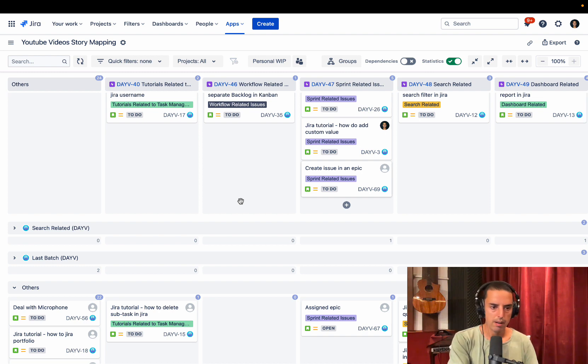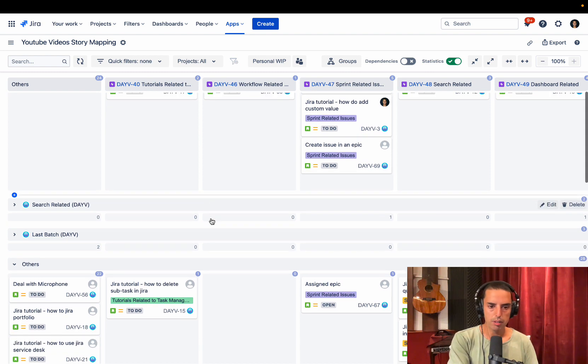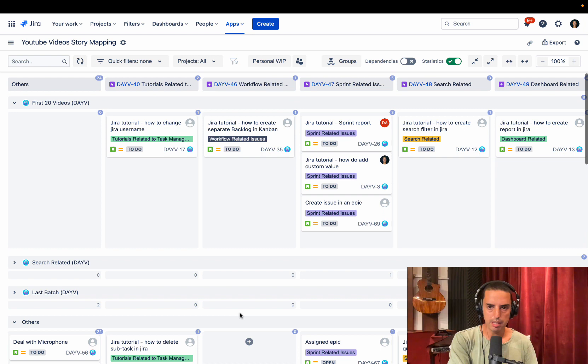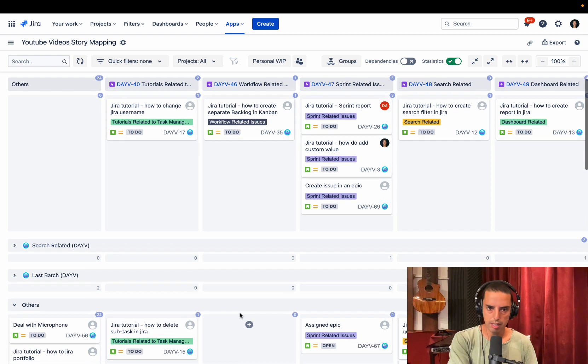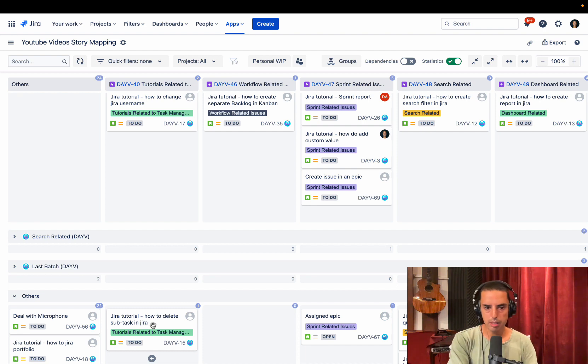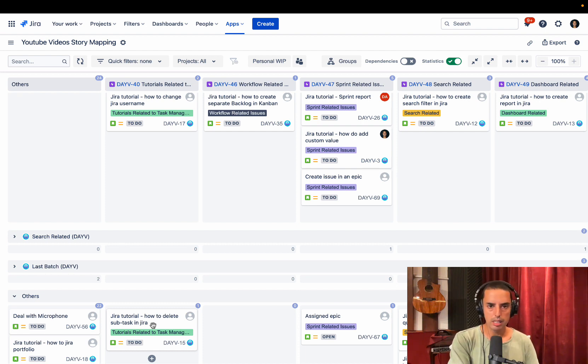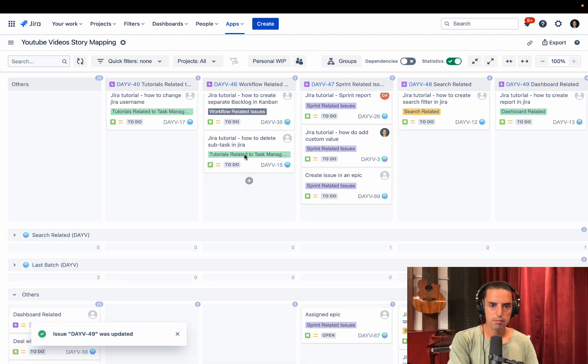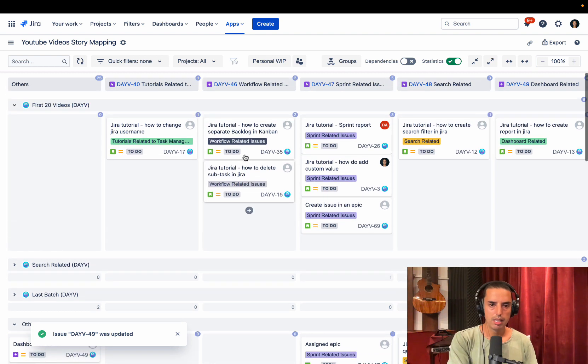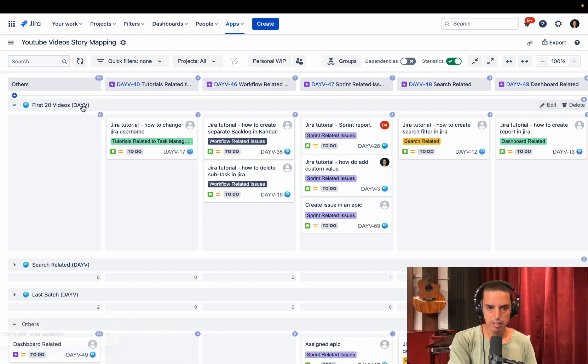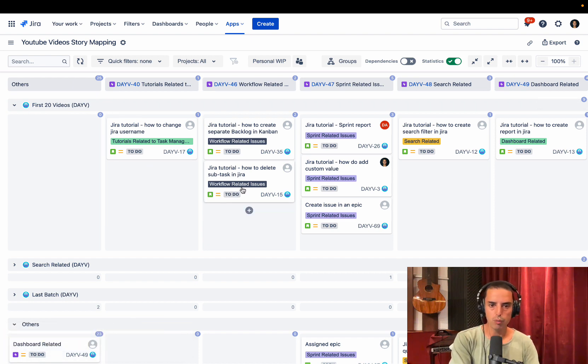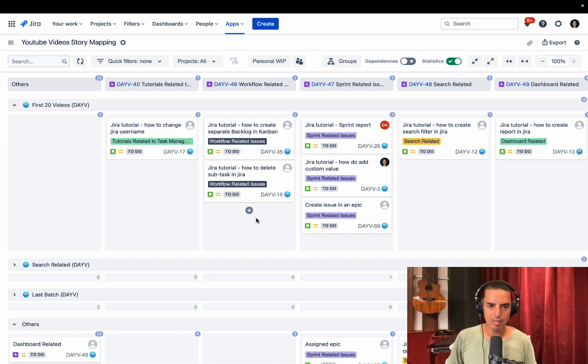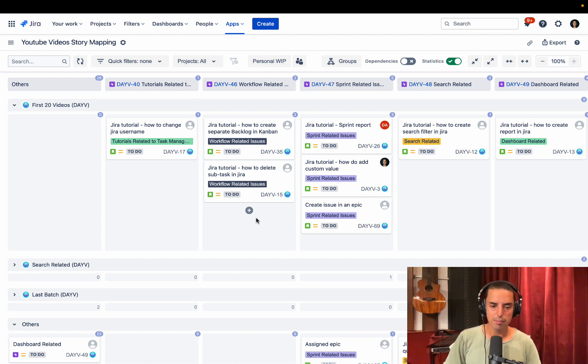So for example, how to delete subtask in Jira. So let's say we want to, we see that we want to do it as a first 20 videos. So we'll make sure that it is workflow related. So we just put it here and it automatically assigned it to a fixed version, the first 20 videos and it automatically assigned it to workflow related issues. So it's very easy to do, just drag and drop. It allows us to do things much more efficiently.